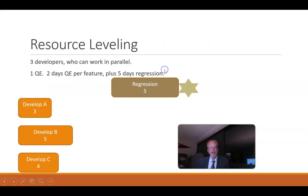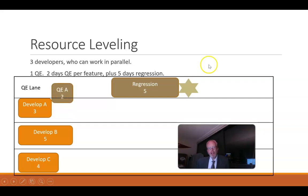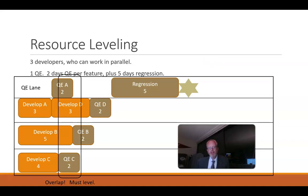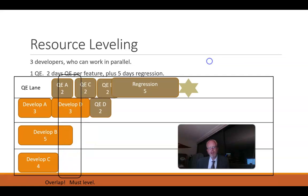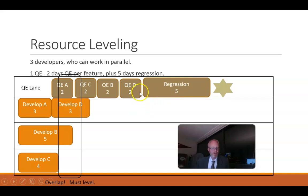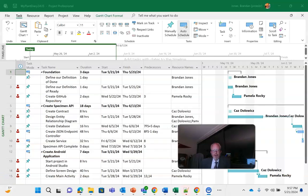So resource leveling, just a quick animation. This is a common occurrence where we have three developers working on something. Each of those items requires two days of quality and so we see when each task is completed it wants to go to the quality lane, but the problem is we have too much going in at once and they end up overlapping. So what we have to do then is level that QE resource that we have to whatever the normal work week is, we'll say 40 hours, and then extend the deadline by that point. And the thing is that Project will do a lot of this for us automatically.